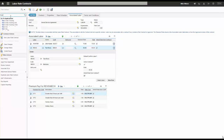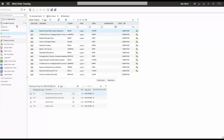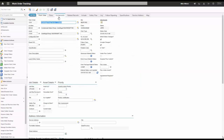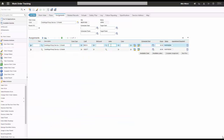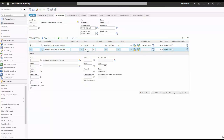I'm going to go back to my work order. The labor rate contract was set up by procurement and is in place. Now as a planner with this pump service for an annual overhaul, because these contractors are on-site every day, I can come in on the assignments tab and enter their information. I put Hunter in as an electrician, change the vendor to the current contract, give him a start date, and add Revis as well. The planned hours come from the job plan. When I click Save, the status on the assignment goes to Assigned.